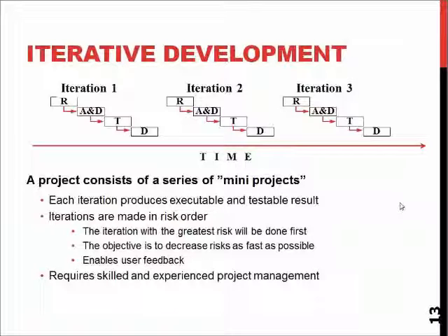We are doing the requirements gathering, analysis and design, analysis and development, testing and evaluation on each iteration, so that we are actually always making the system more and more defined and more refined. It also means that we actually can collect user feedback. So we can give a prototype to our potential customer or our paying customer and see what they think about it and make changes in the later versions.